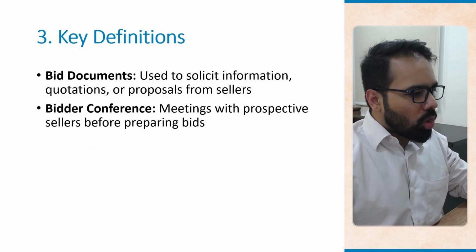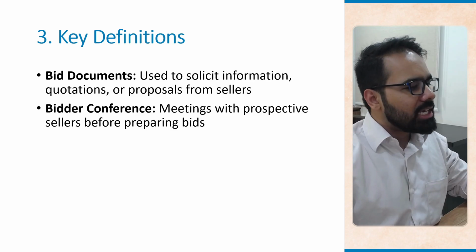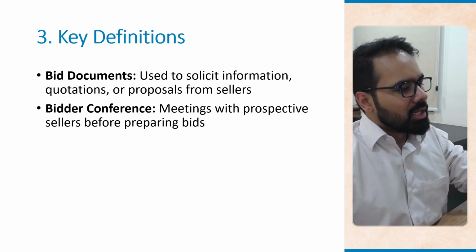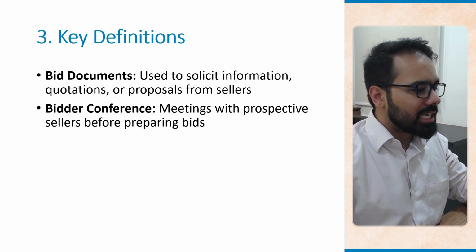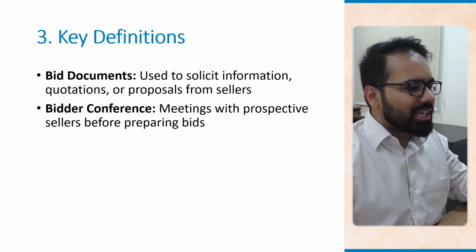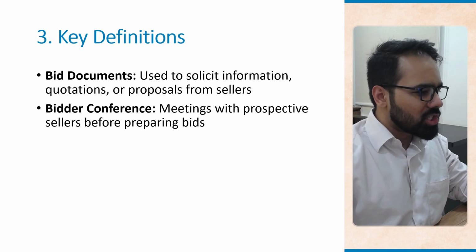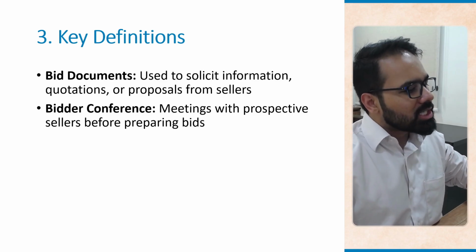Then there's bidder conference. This is a meeting which is held before the bids are submitted. This ensures that all vendors have the same understanding. For example, clarifying technical details of hosting infrastructure before vendors submit proposals.